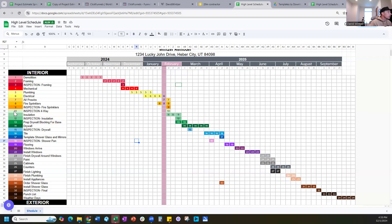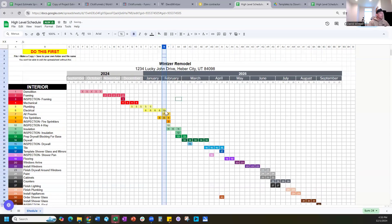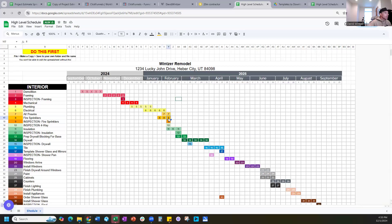As you go through it, you can ask: what's task 8? That's fire sprinklers. Superintendent, have we started fire sprinklers? No? We're two weeks in and haven't started. What about task 10 — the four-way inspection? Are we still on track for that? Does that mean installation starts Tuesday, or Thursday-Friday? Should we be starting installation next week? Are we on track? This is a great way to get a bird's-eye view of where your schedule is and what's pushing.